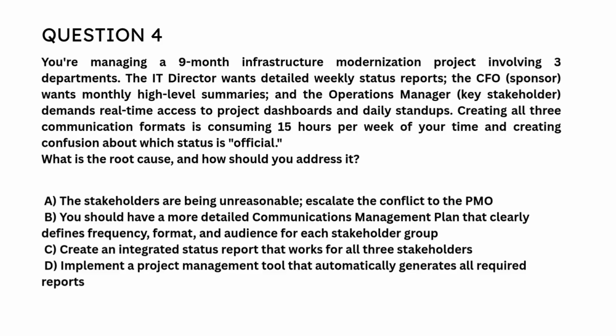A. The stakeholders are being unreasonable. Escalate the conflict to the PMO. B. You should have a more detailed communications management plan that clearly defines frequency, format, and audience for each stakeholder group. C. Create an integrated status report that works for all three stakeholders. D. Implement a project management tool that automatically generates all required reports. Correct answer is B. You should have a more detailed communications management plan that clearly defines frequency, format, and audience for each stakeholder group.